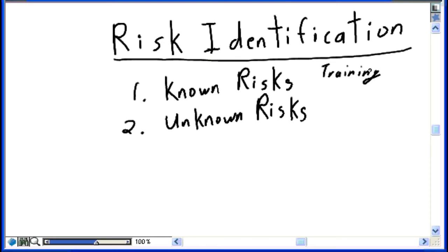But as a wise project manager, you have this fear that there will still be some learning curve. There will still be some issues with learning the new programming language, even at the end of 5 days. That's the risk. The risk is at the end of 5 days, the team will still not be fully versed in the programming language. So therefore, you need to identify that there's a risk that you may need more training. You may need more time. You may need more dollars to provide more training to the team if at the end of the 5 days, when the team is back on the job site, they still aren't performing according to plan.